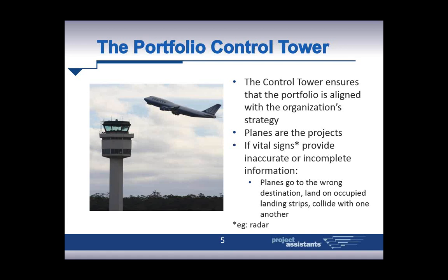When Jim takes the floor in a few minutes, he's going to talk to you about some of the key performance indicators we can look at. And when we talk about, for example, something like a schedule variance, it can be predicted. Right? When Microsoft Project gives us a schedule variance, it can be an actual variance that has already occurred, or it can be a predicted variance, right? Something down the critical path has already moved forward against the baseline.